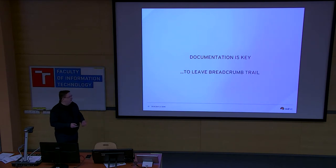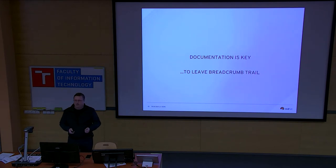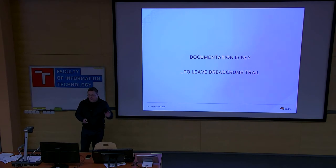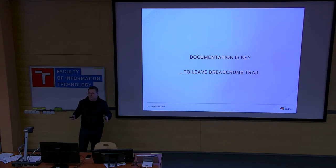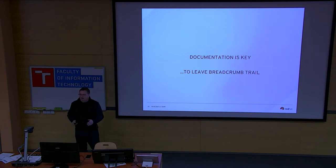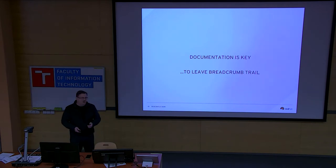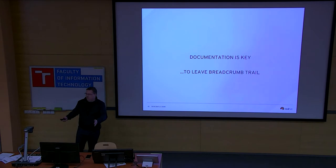The other kind is documentation that leaves a breadcrumb trail. When my colleague was running RHEL 6, she left a lot of project-related documentation behind — meeting minutes, phase exits, retrospectives, tons of stuff. When I started on 7.0, all of that was like a chest of gold I found. There were things that went wrong, things that went right, a lot to learn and use for 7.0 development. Even if you don't need it now, that documentation is for future generations and future teams.